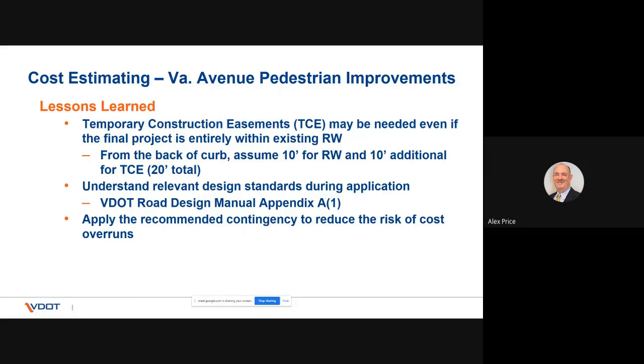The special provision that Eli spoke of earlier, concerning giving the contractor a certain number of days to do the work, that's something that we found out most recently that we can use. I see that as a very valuable tool. This type of work that we've advertised, this is filler work, probably for someone. A prime, when he's hungry, is probably not going to be going after this work because, again, there's not a lot of profit involved with this project.